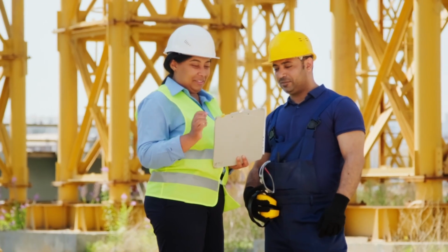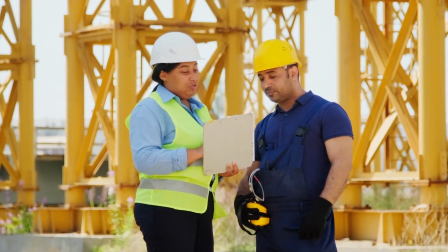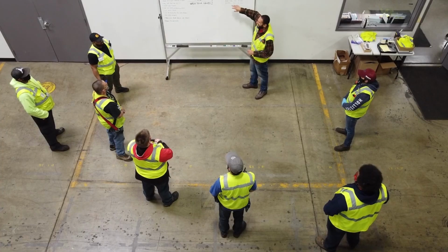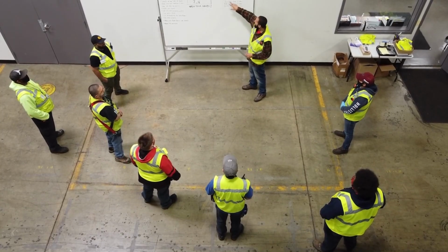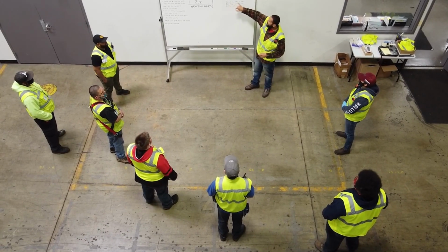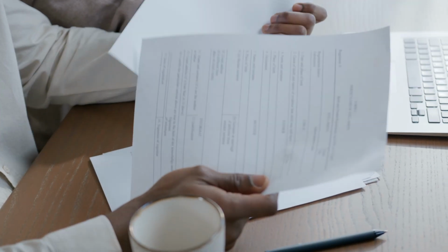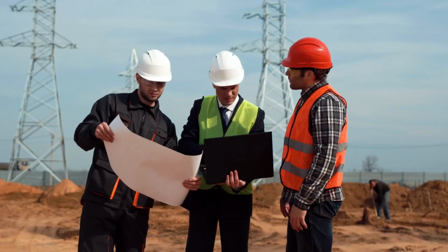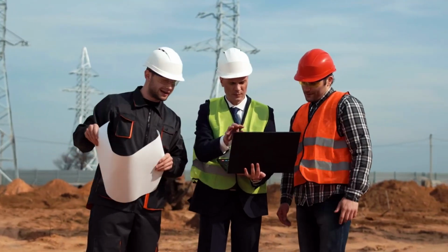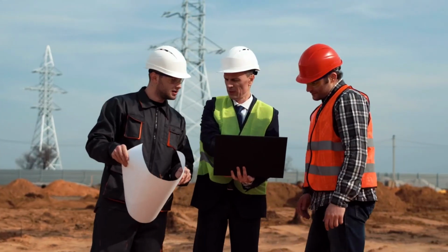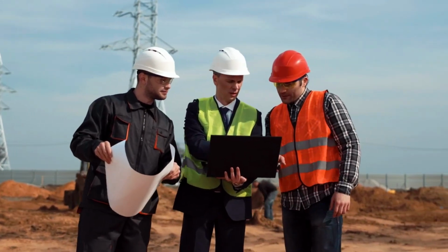Practical communication methods include pre-start meetings and site inductions, toolbox talks focused on key project risks, weekly site coordination meetings, monthly project reviews and dashboards, simple summaries, top risks and current actions. Communication should be clear and short: what the risk is, what the controls are, who is responsible, what to do if conditions change.